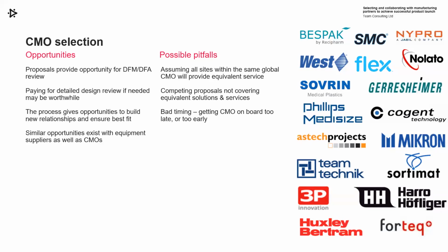Beware if you're sending out competing proposals. You might start off with a common RFQ, but as responses come in, you may get proposals that aren't covering equivalent solutions and services, so make sure you're bearing that in mind. And then the key thing, as I mentioned, is bad timing. Getting CMOs on board too late or potentially too early can damage things. One of the things to think about is the speed.